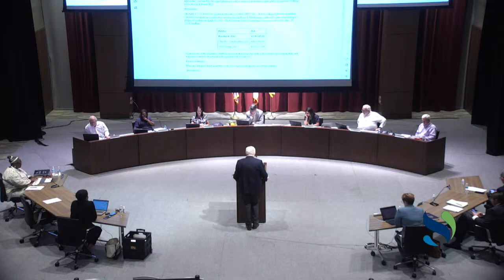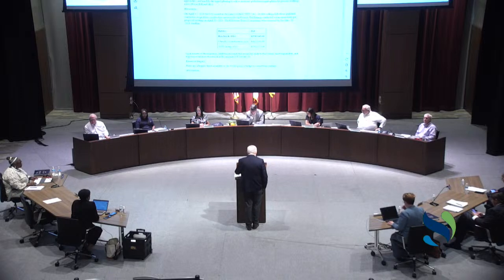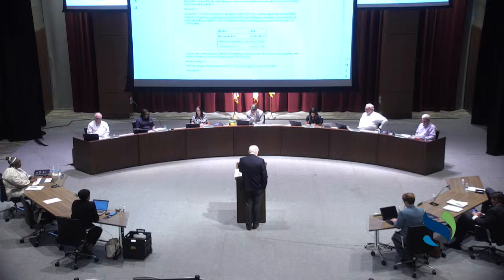Reedwick LLC was our low bidder at $358,043. Reedwick has successfully performed other signal-related projects for the city of Sandy Springs. Amshiv Construction bid $463,000, and NGT Group, a contractor we have not used before, submitted a bid price of $738,277. Upon review of the bids and the responses, staff recommends award to Reedwick in the amount of $358,043 to execute this contract.